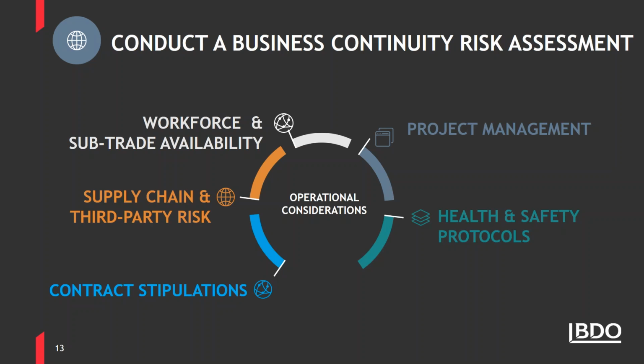If work on all or some projects must be suspended, you want to make sure the project sites are properly protected and secure. Also, you need to make sure that you're checking your payment processes and ensuring that the payment cycle is not impacted. Are payment certifiers still planning to attend on site to certify work, or is there some accommodation required? If so, have you made the appropriate plans and implemented those accordingly?